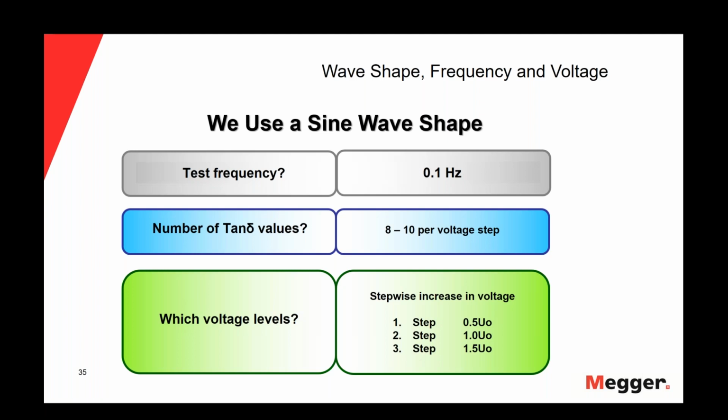We will apply 3 voltage steps. The first one will be 0.5 U0, the second one 1.0 U0, and the third one 1.5 U0.